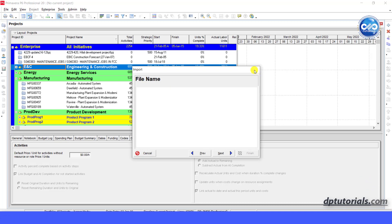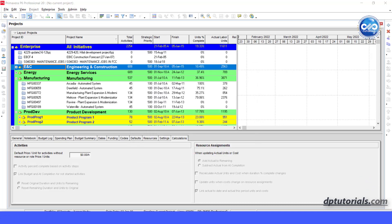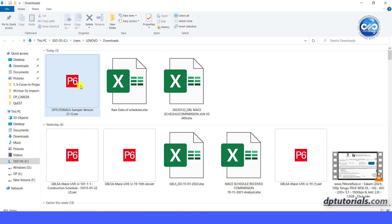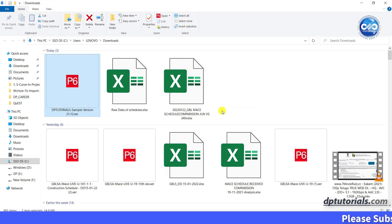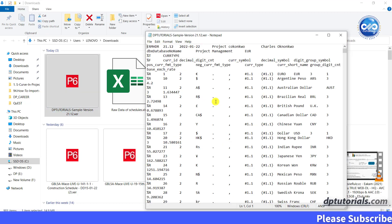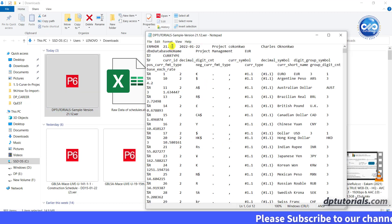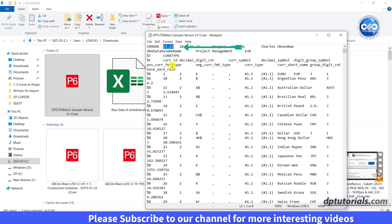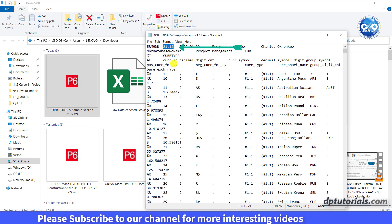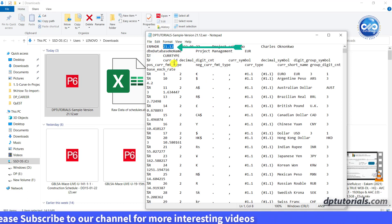To solve this, go to the XEA file location. Right click and select open with and select notepad. The XEA file will open as a text document. And on the top left, you can see the version number of this XEA file which is 21.